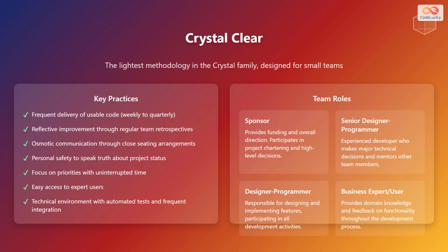Crystal Clear is the lightest methodology in the Crystal family, designed for small teams. Key practices include frequent delivery of usable code, from weekly to quarterly releases. Reflective improvement is achieved through regular team retrospectives. Osmotic communication is facilitated by close seating arrangements. Personal safety ensures team members can speak truthfully about project status.